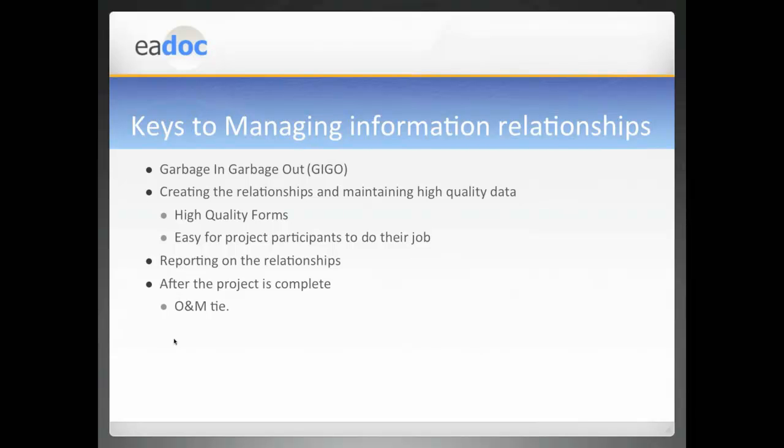And then we'll touch on a little bit after the project is complete, the O&M tie. With relationships, it's not just an RFI to a submittal or a submittal to a drawing. It can also be the submittals related to a pump. And so you can link this information to those major materials. And this is going to tie a little bit into next week's presentation on operations and maintenance preparation as well. So I can create the links around how my data and communication on this job, O&M manuals, warranties, and test reports relate back to those major materials on my project, and use that for navigation in the system.